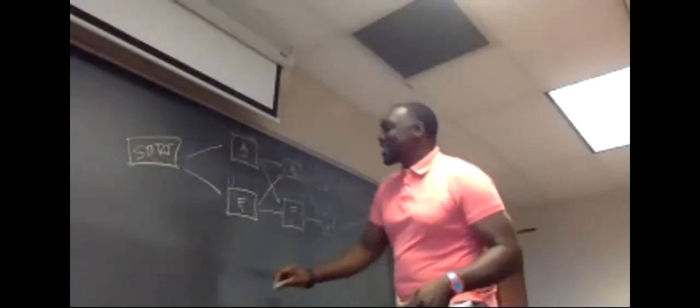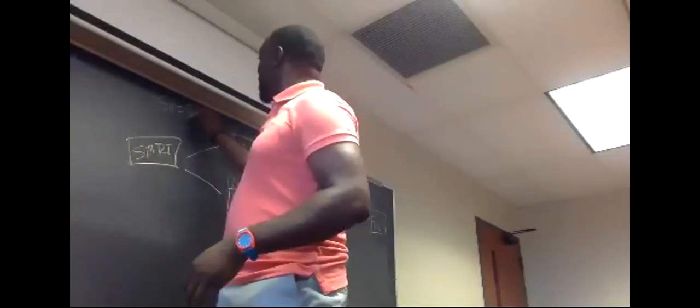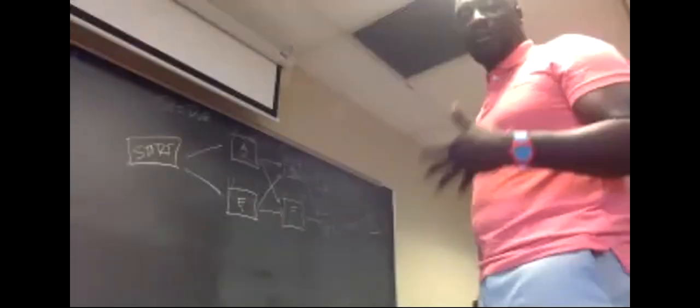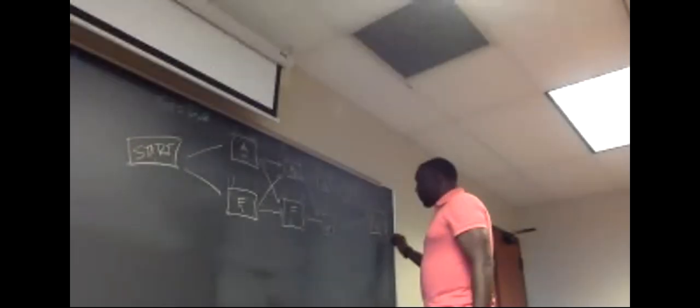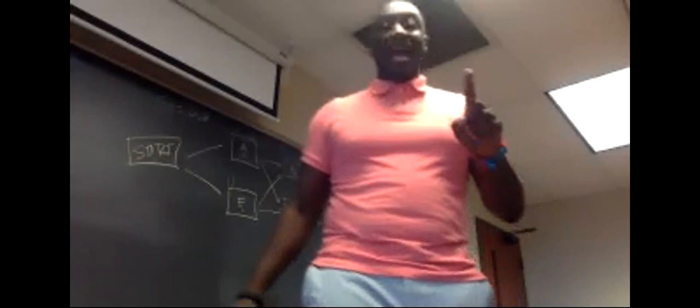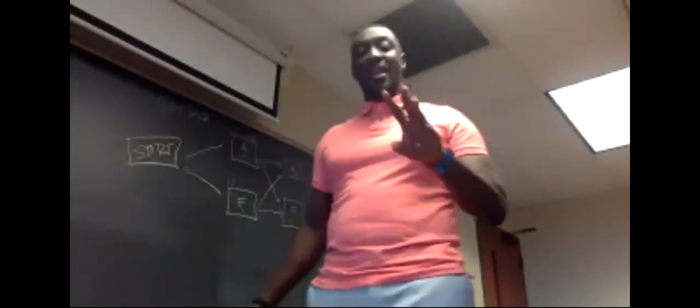So 15 days. We write this as 15D equals my duration, DUR, my project duration, right? Remember, the standard duration in project management is 1 day. I don't care if it takes 2 hours, it's still considered 1 day, all right? So now, third step. First step, we drew the diagram. Second step, we calculated forward pass. Third step, we calculate backwards pass, right?